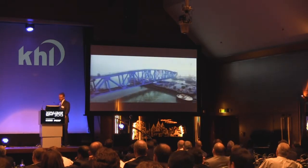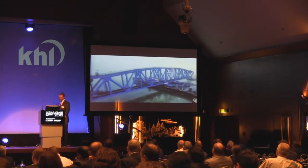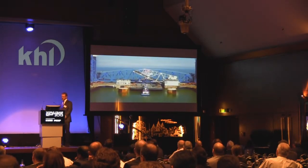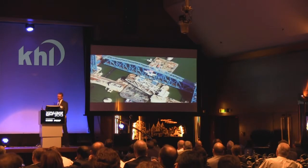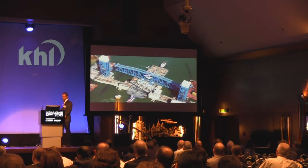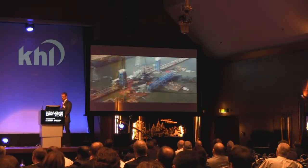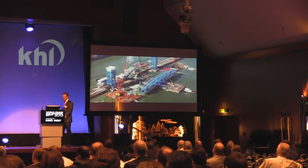As part of the rigging and final placement of the massive bridge on its bearings, it was crucial that the center line of the bridge was precisely positioned on the barge. The placement was based upon field surveys of the barge and the channel center lines. Since the center line of the new bridge was not the same as the center line of the existing channel, Burkhalter was required to come in offset.